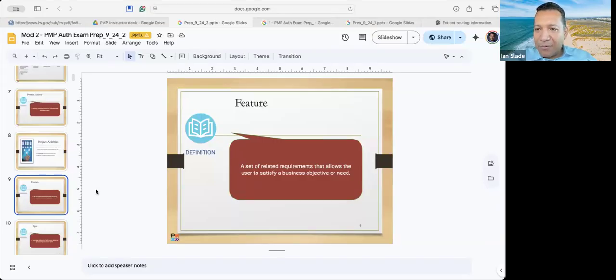So another way to think about it is, is this something that's reportable, right? If it's too small to be reported, then that's usually just under the activity. So for example, a project manager wouldn't ask you, hey, Kenny, did you actually put in all 4 screws, right? They wouldn't go to that level. They would just say, are the brake pads attached?